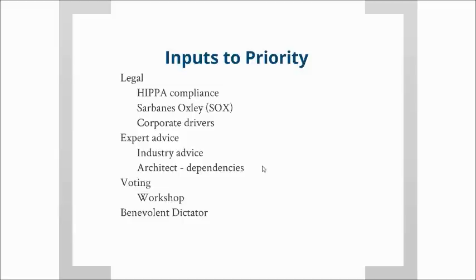something to be delivered. For example, there's a piece of code that we want to deliver or we want to build because it's the most important thing, it's top of the list, but it requires an API or an interface with the billing system. But the billing system can't provide that because they've got a backlog and they're not going to be able to get to it for 3 months. Well, we don't want to build this functionality only to sit it on the shelf to wait 3 months for this API to be built.